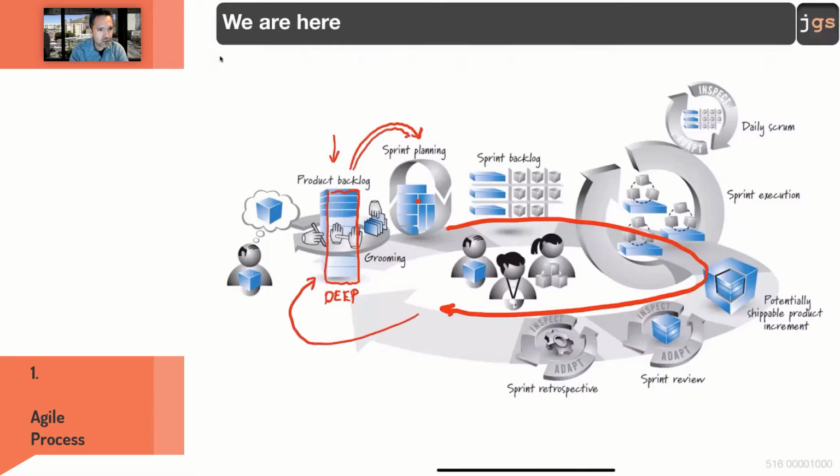Why? Because you're not only selecting randomly, you're selecting according to this estimation that you did with the story points or with time. So you know the task, you understand the task, you put an estimation on time or difficulty to the task, and then you select all those things that you know your team can finish in the time that is the sprint, 1 or 2 weeks. So it could be really, really bad to have something here that was not done, unless you have a very good reason for not finishing.